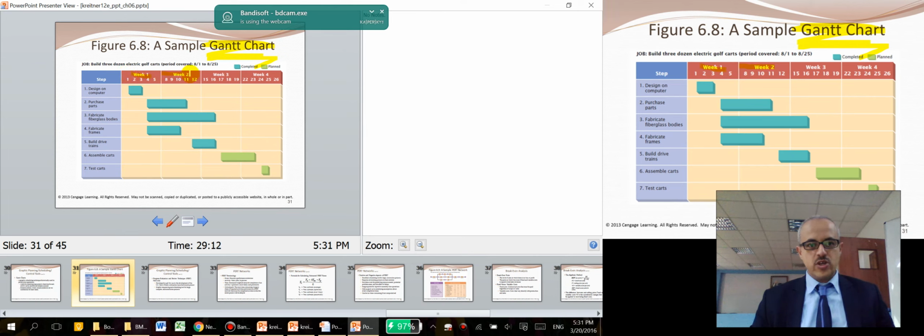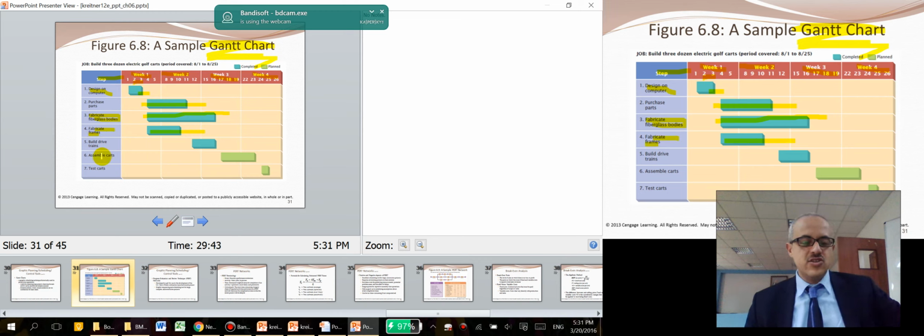What the Gantt chart shows here is an example. It shows you time, week 1, week 2, week 3, week 4. And then it shows you here the steps. I will design a computer from day 2 to day 3. Then we will purchase parts between day 5 and day 11. Step number 3, we will do fabrication of a 5-finger glass, from day 4 until day 15 or 16. Number 4, we will do fabrication for the frames. And then we will build a drive train, from day 12 to...